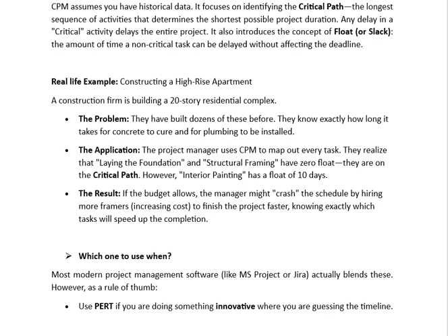So the result is, if the budget allows, the manager might crash the schedule by hiring more framers, increasing cost to finish the project faster, knowing exactly which task will speed up the completion.